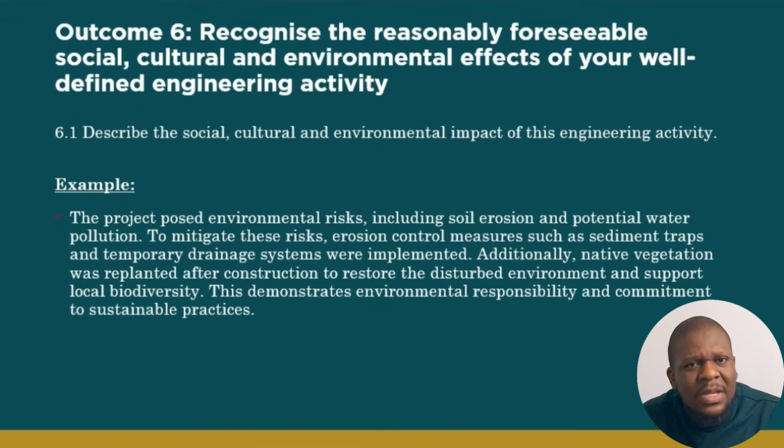This project posed a significant environmental risk. Why? Because of soil erosion and potential water pollution. To mitigate this risk, I put in place erosion control measures such as sediment traps and temporary drainage systems. Additionally, for vegetation that was disturbed during construction, I ensured that I replanted it to restore the disturbed environment and support local biodiversity. This demonstrates environmental responsibility and commitment to sustainable practice in my project.